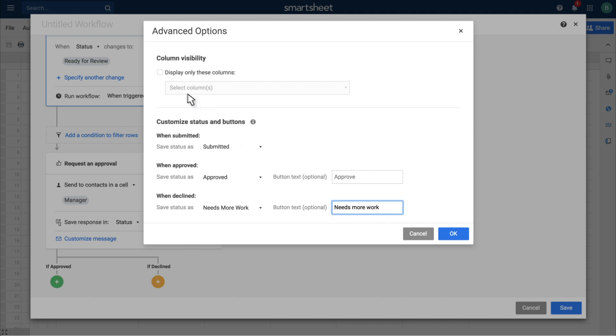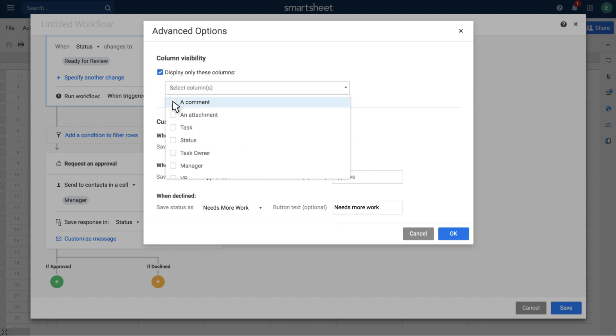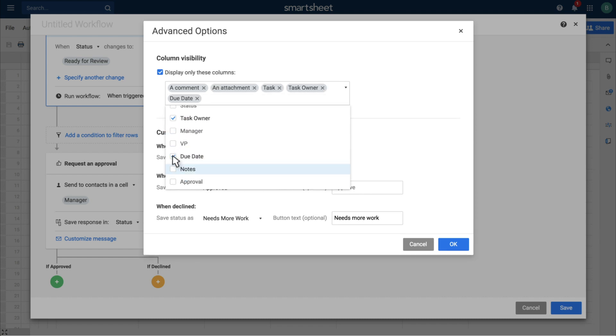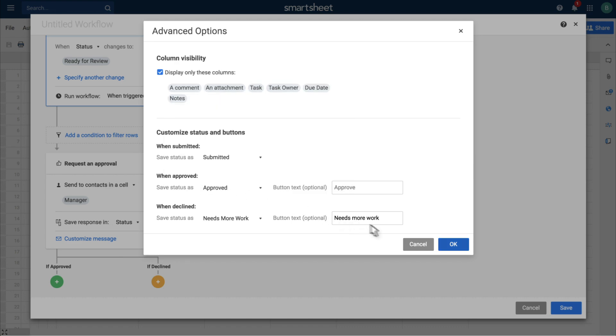Provide the approver with context for making their decision. Select which columns to include in the request and add a subject line and message.